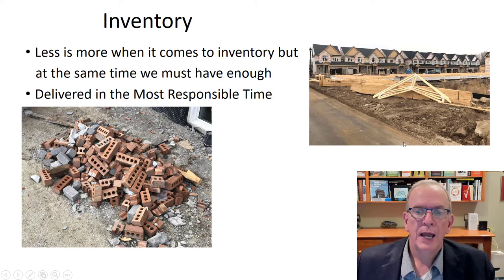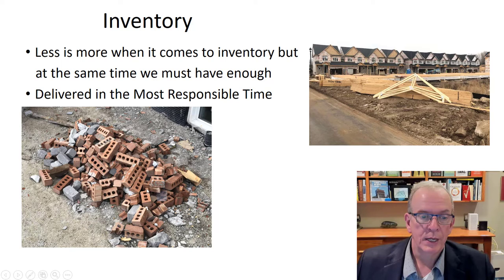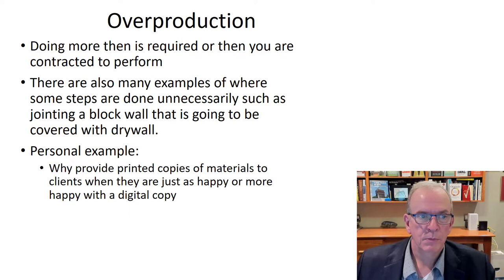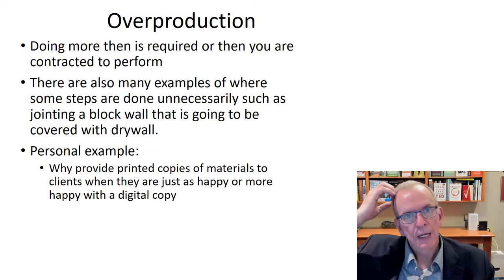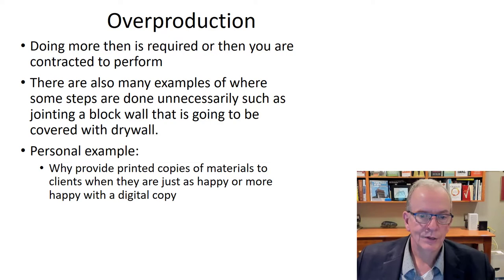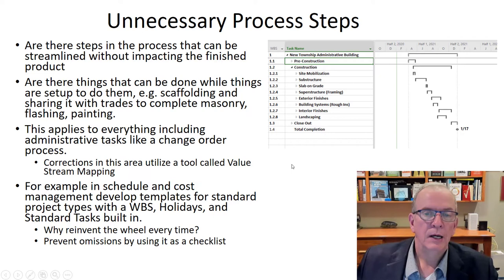Inventory: we don't want things way ahead of time. We want to schedule things close to the work at the most responsible time, not in the way of the work, and not ordering tons of extra materials that end up as waste. Overproduction: actually doing more than you need to do. For example, a plumbing subcontractor prefabbing shower supply lines with control valves makes four or five extras, and when they're done they throw them out — that's overproduction. Unnecessary process steps: making sure we have processes in place and don't do unnecessary steps.